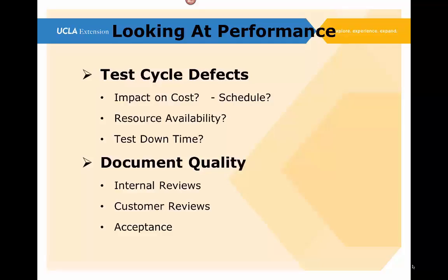But when they've finished with that creative part, and it comes time to document the functionality and how that works, and how you would put that into a user's manual, or into a maintenance manual, or into some other type of manual, training manuals, there isn't the same motivation for them to sit down and do an extensive writing job on that. I have beaten that one several times by bringing in a tech writer.